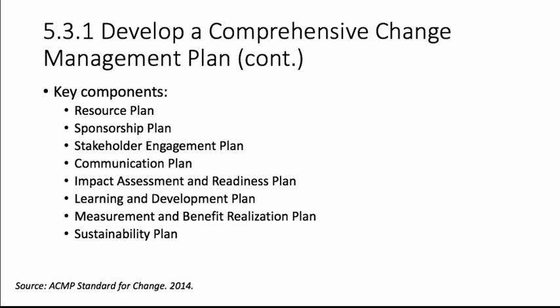Fourth, communication plan. This defines internal and external audiences, information, and feedback required for those leading and affected by the change, and specific communication activities and events. Fifth, impact assessment and readiness plan. This identifies the action, roles, and responsibilities for detailed and impactful analysis, following the high-level impact analysis undertaken in the assessment phase described in 5.1, evaluating change impact and organizational readiness. It details how and when impacts will be captured during the design, build, and implementation phase of the project, including impact categorization, mapping and ownership of impact mitigation and management. The readiness plan identifies the organization, customer readiness criteria, and readiness management approach.